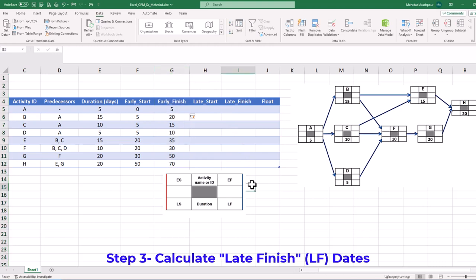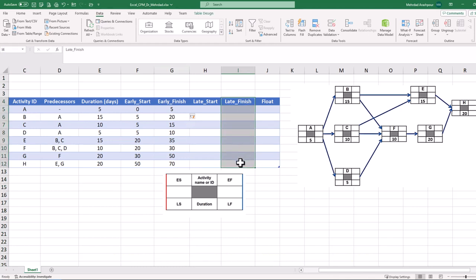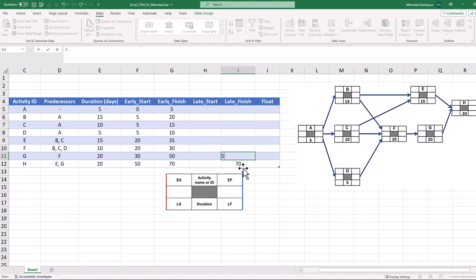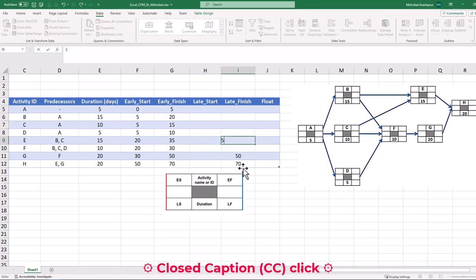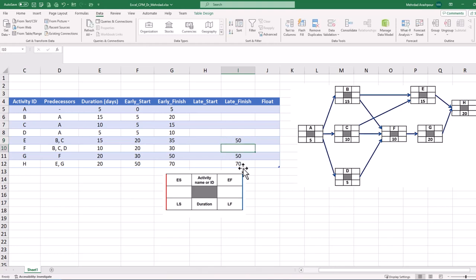Step 3 is to calculate the late finish date of each activity based on the project network logic. We start with activity H, which is the last project activity with a late finish of 70 days. We can record these late finish dates in our workbook. A duration of 20 for activity H suggests a late finish date of 50 for activities E and G. Activity G has a duration of 20 days; it will start on day 30, which will be the late finish date for activity F.